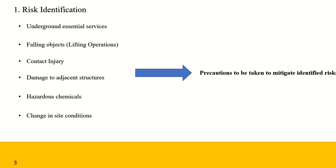As you can see in this slide, the risks relevant to the construction site of the excavation projects include underground essential services, falling objects, contact injury, hazardous chemicals, damage to adjacent structures, and change in site conditions. To address these risks, mitigation actions are required to be taken.